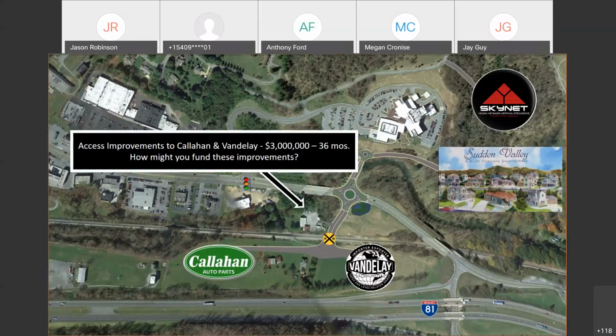And again, good across the board. You guys have identified the need to go after the economic development access, which is definitely a good strategy for these. These are going to be manufacturing, industrial type of projects, which would be eligible for the EDA access. A lot of you folks pointed out that the rail crossing would be a good option for the improved access for the rail crossing. There's actually a separate piece. If you look in SMART Portal, there's a separate portal for railroad crossings, at-grade railroad crossings. FHWA and VDOT work together to provide a specific set-aside for those types of improvements. So that's definitely a good strategy for this one.